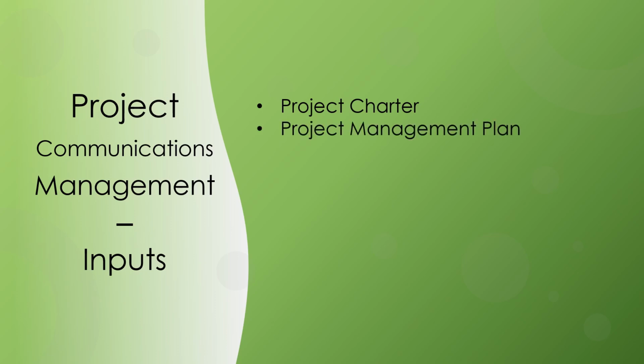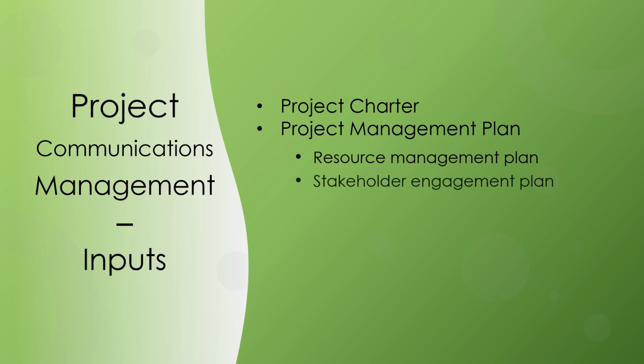Project management plan. Project management plan components include the resource management plan, which provides guidance on how team resources will be categorized, allocated, managed, and released. Team members and groups may have communication requirements that should be identified in the communications management plan. The stakeholder engagement plan identifies the management strategies required to effectively engage stakeholders. These strategies are often fulfilled via communications.